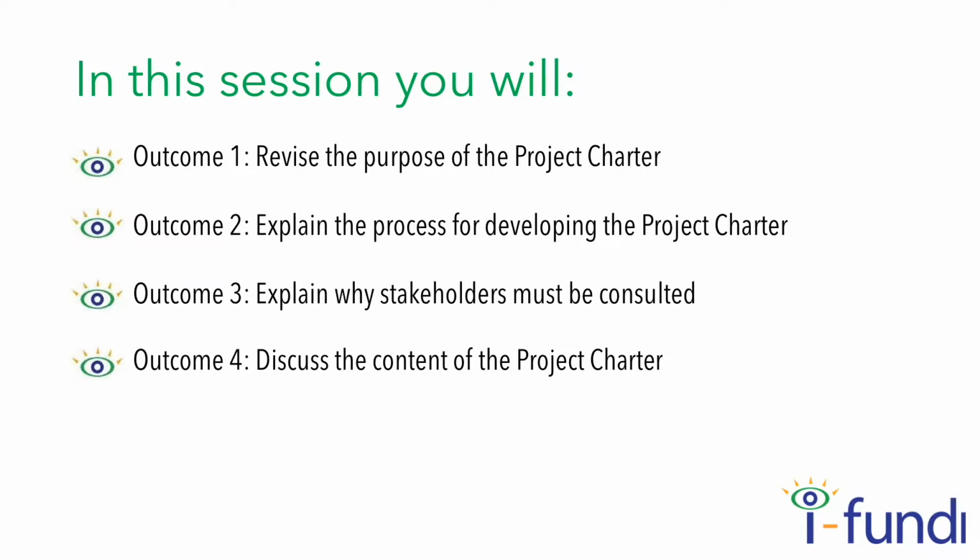The project charter lays out the initial requirements of the project. It should answer the following questions. What is the project going to do? What is the business case for doing it? Who wants it done? Where is the money coming from? Who is going to manage the work? And who is going to do the work? The project charter contains all the information listed above at a high level. The details are added during the plan and design phase of the project.